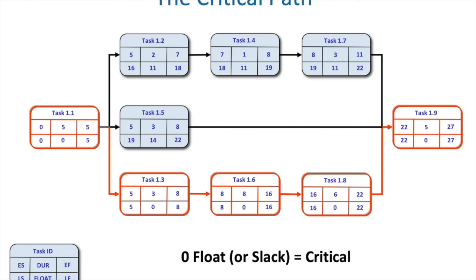So you can see how, by determining your critical path, you can allocate resources to make sure your critical tasks are done before some of the other ones that have more flex time. As a project manager, it gives you a lot of flexibility or a lot of leeway where you can allocate limited resources, or you can readjust your project to make sure that you are successful.